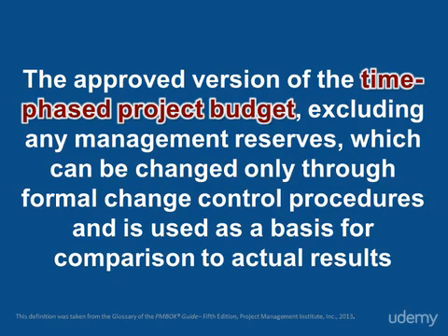Well, the question, as so often with the PMBOK definition, is what on earth does this mean? Well, time-phased means that the cost baseline will show you your budget over time. As a comparison, the project schedule shows you which activities are executed over time, and the cost baseline shows you what budget, what money you need over time.